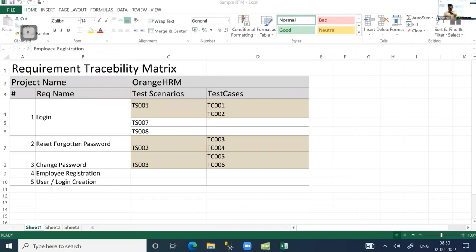Is one person testing the whole product? Right, no. Requirement-wise, sometimes module-wise or sub-module-wise, work will be allotted. First I list totally what requirements are to be covered in our product, and requirement-wise I allot the work to my team members. Once she completes scenarios and test cases for requirement 1, the numbers get updated here. It is implicit day-to-day work by the team members.